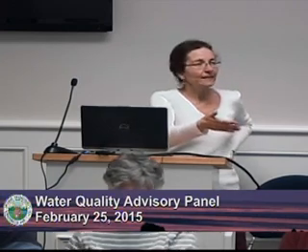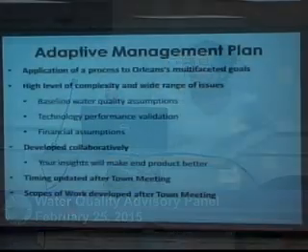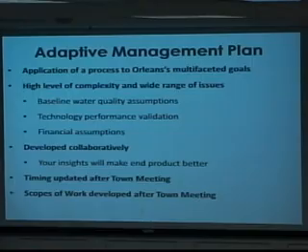So this group has tried to add a timeline, a start time and a finish time for projects based on our best understanding. But those start dates, how long it takes to permit a PRB, how long it takes to get contracts signed so that we can buy equipment to install shellfish, those are going to change, and so we want to continually update them. And I guess the last point is that we are not, in this adaptive plan, developing a scope of work.